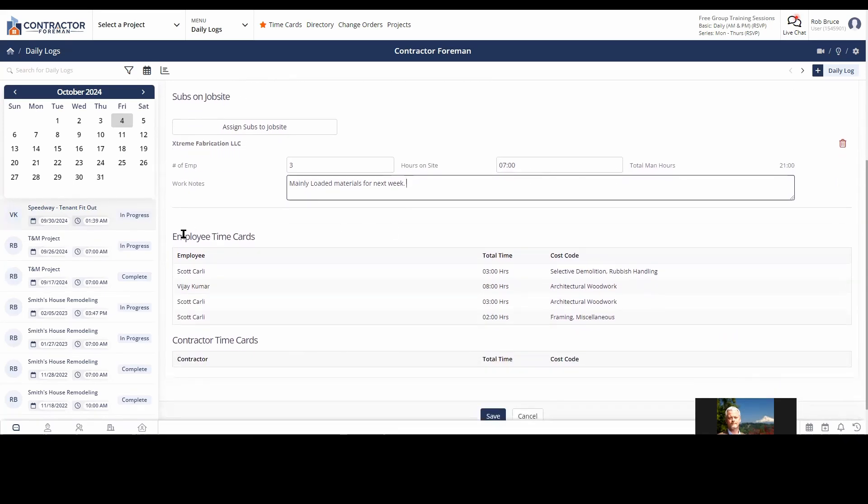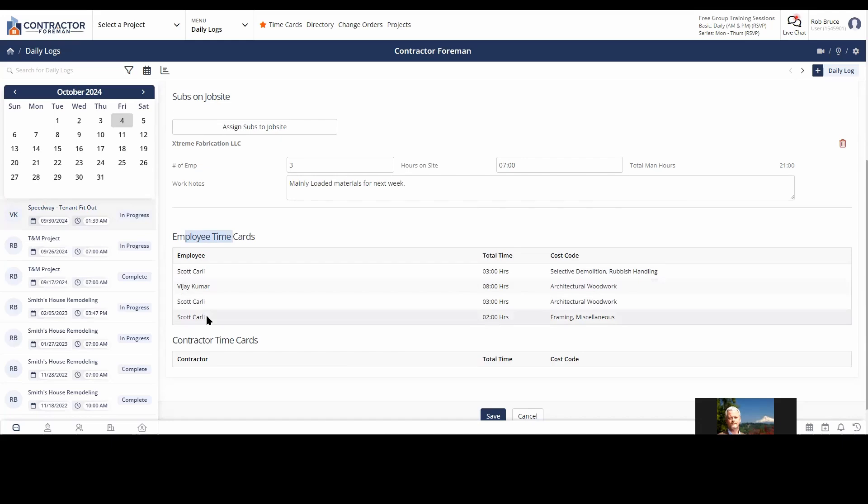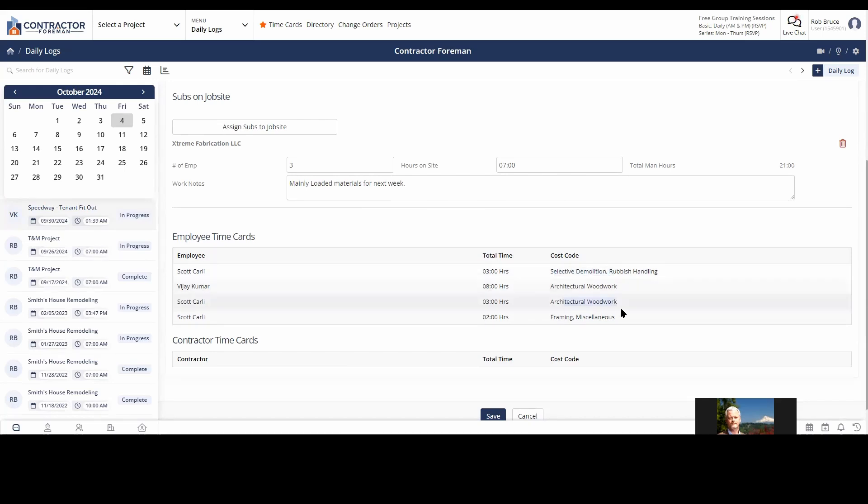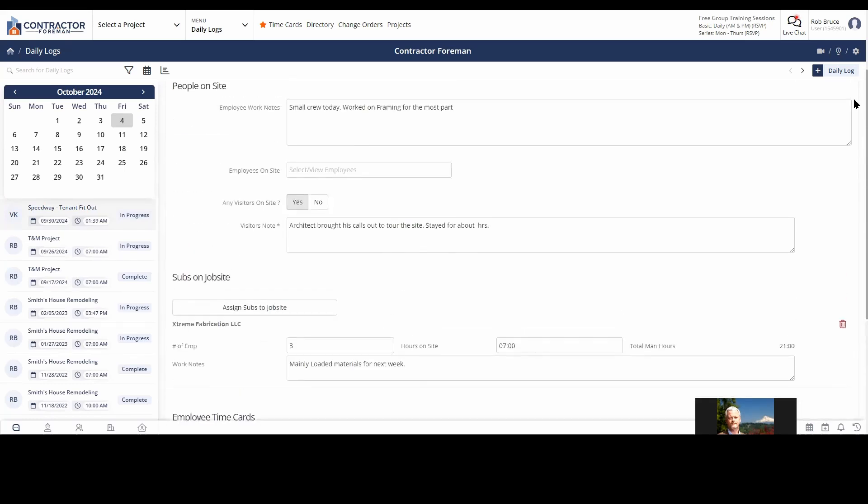Employee time cards. When somebody's filling out their time card and they were on this job, it's going to automatically pull them into your daily log for that day. And what it does, it does it in a lot of detail because you can see here, Scott Carley is listed three times in one day for work he did on the job. And that's because it's all a separate cost code. So Scott said he was working on selective demolition and he said he was doing architectural woodwork and then he was doing miscellaneous framing. So it breaks it out for us. So again, we can go back and see what was this person doing during that day. And you can also track contractor time. I'd be a fan of that myself, but if you do have a reason or a need to track your contractor's time, you can assign them the ability to use the time cards in Contractor Foreman.